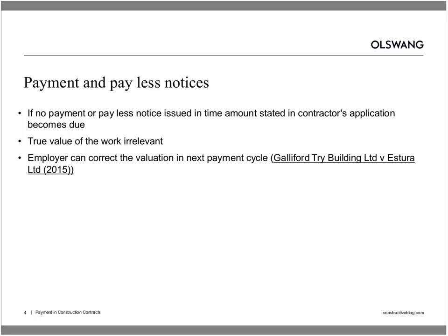I suppose that raises the question, what can the employer do? And none of the options are necessarily particularly attractive. The best option, of course, is to correct the overpayment in the next valuation. And I think the important thing to keep in mind here is that the employer is not entitled to recover any overpayment at an interim stage unless there's an express contractual right to do so.